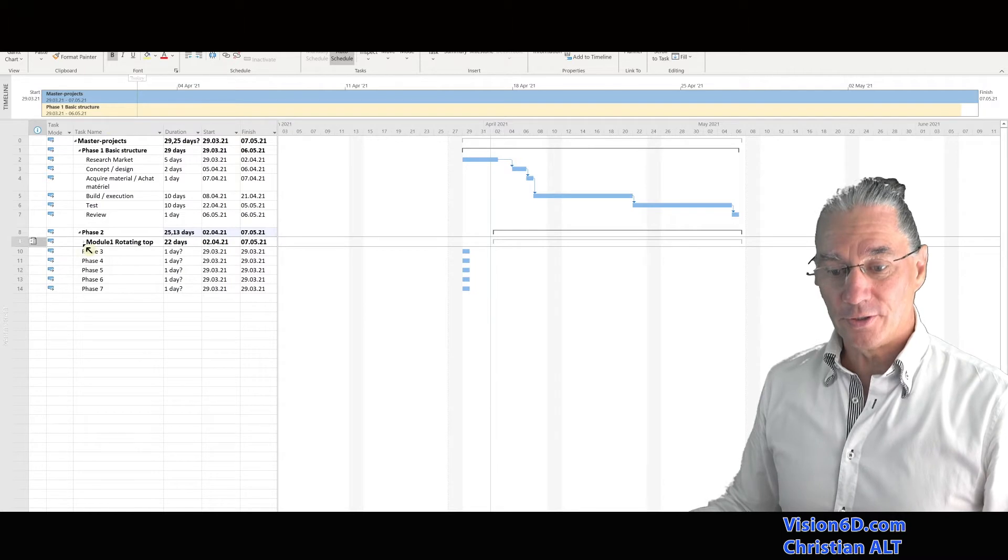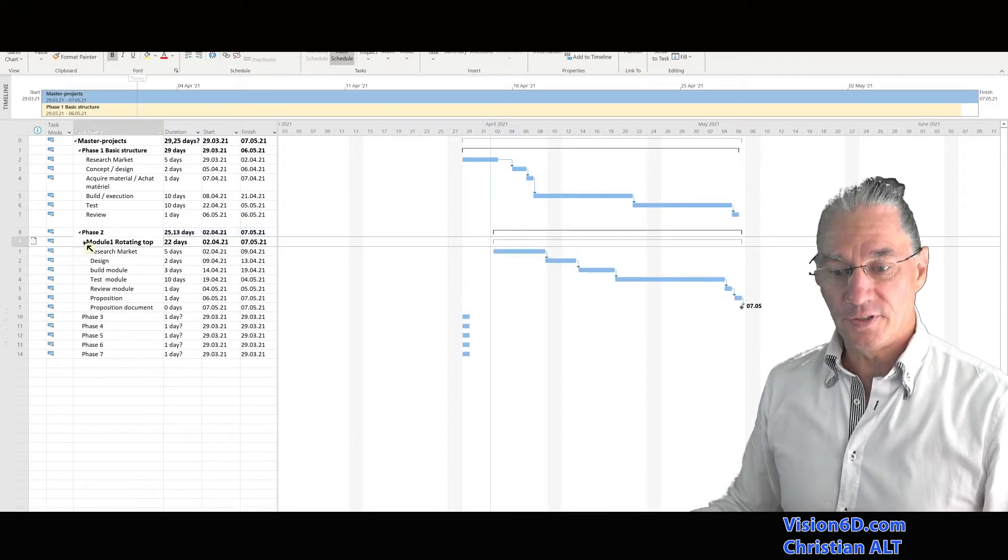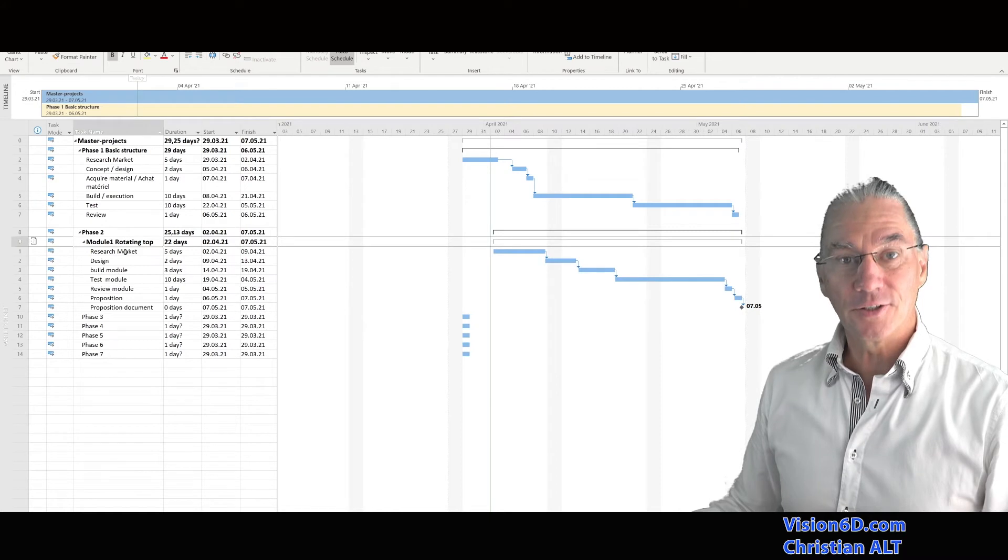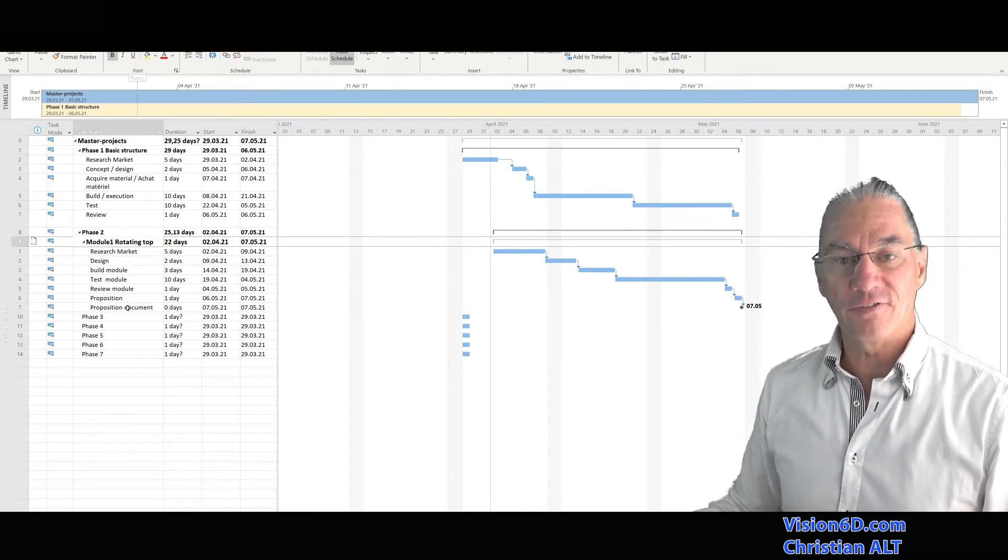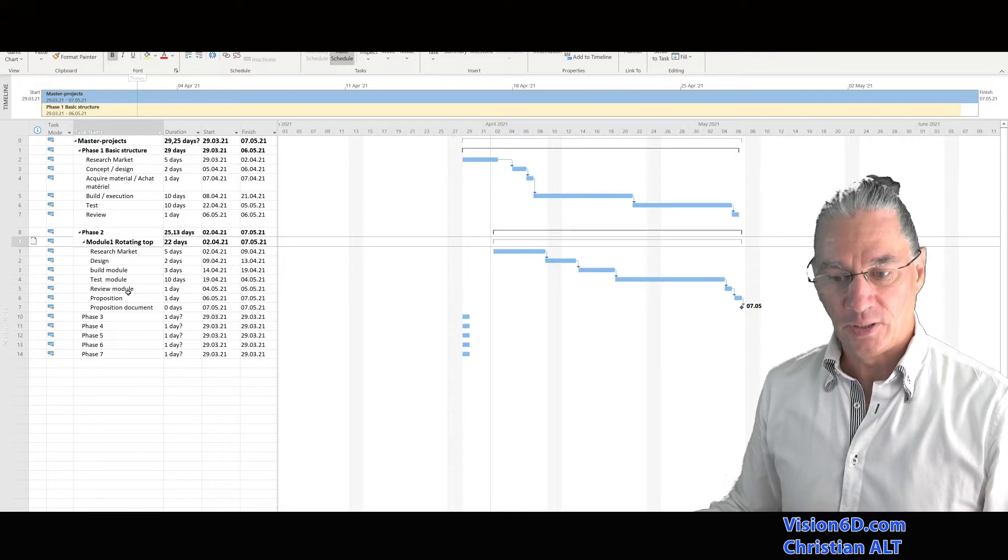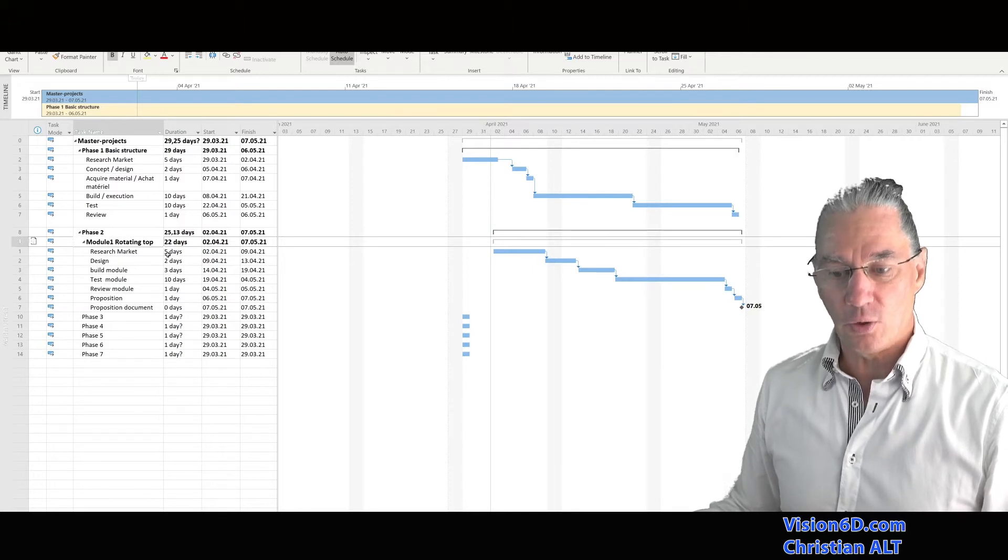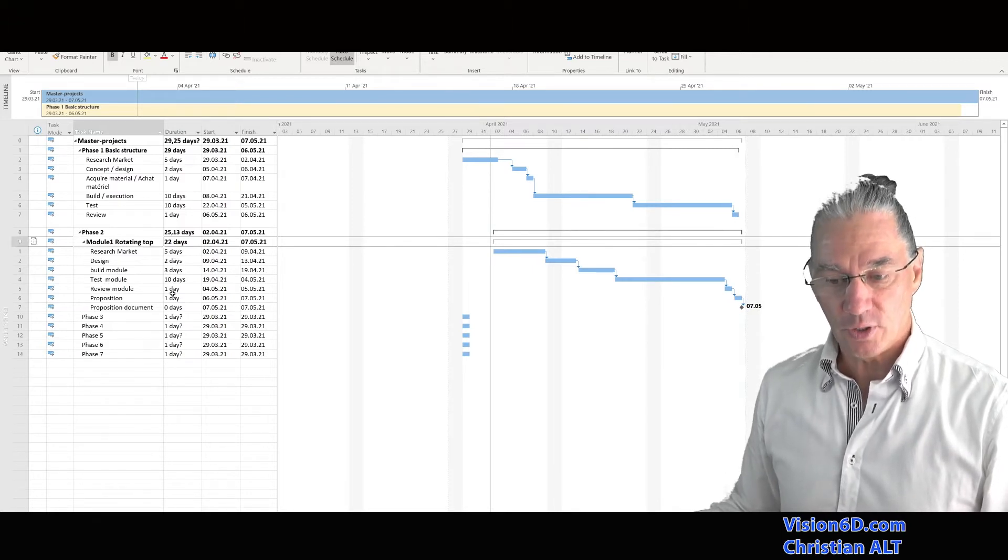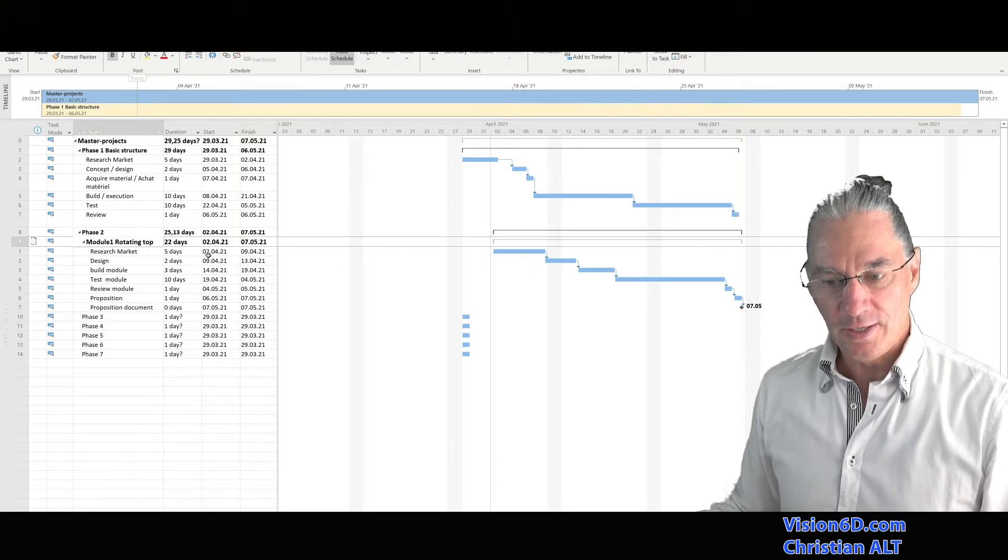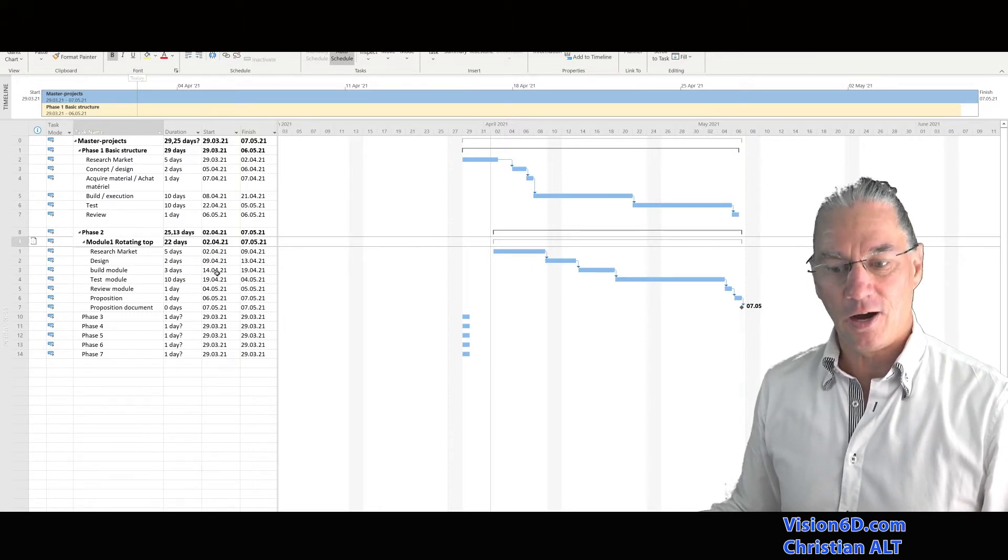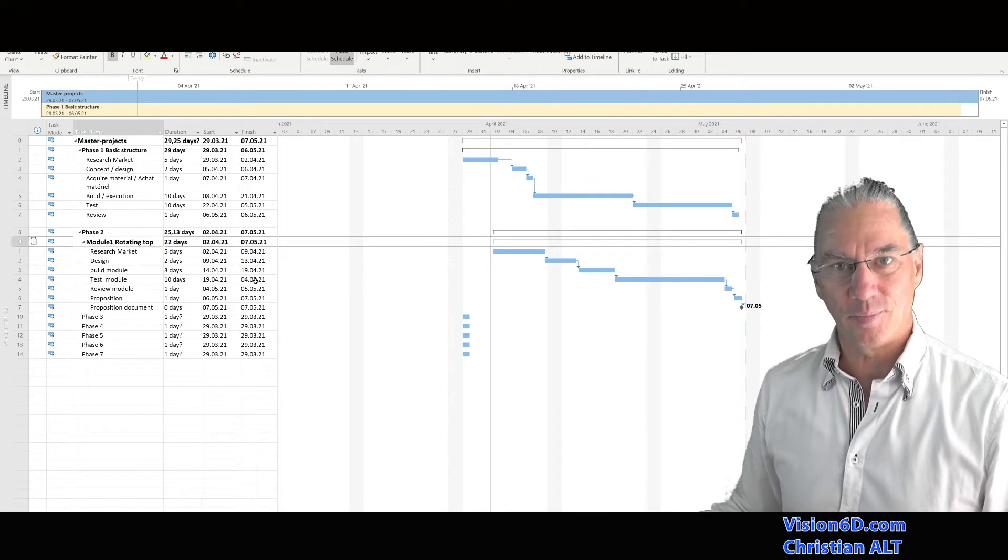So of course, now we are going to look what is into module one. For this, I click here. And you see that we find all the tasks that are defined in the other file. We find also the durations which are reported here, and start and end dates are exactly the same.